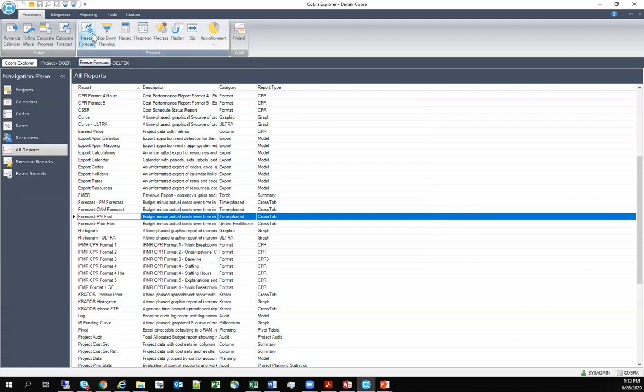With the different classes, you could still have your original proposal and then make these changes in a copy, where I did that reclass, as a new version of the proposal. Then you can compare: here was the old, here's the new, here are the deltas. Likewise, if you've had new rates since that time, it's very easy to apply those new rates to see what that cost impact will be. So for proposals, you have quite a bit of functionality that would certainly come into play.